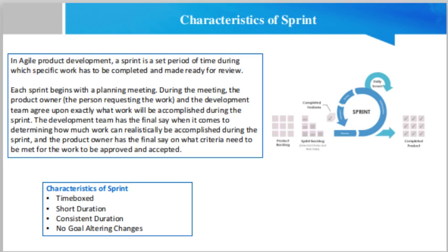Imagine if sprint 1 is of 4 weeks duration, but sprint 2 is for 1 week. If there is any slip over from sprint 1, then it might not fit in sprint 2 at all. It will make the life of the Scrum Master difficult. A fixed duration also helps in quickly coming up with the number of sprints, assuming there is a fixed release date. In the case of variable duration, a lot of effort will be needed upfront to figure out the number of sprints and the logic behind it.